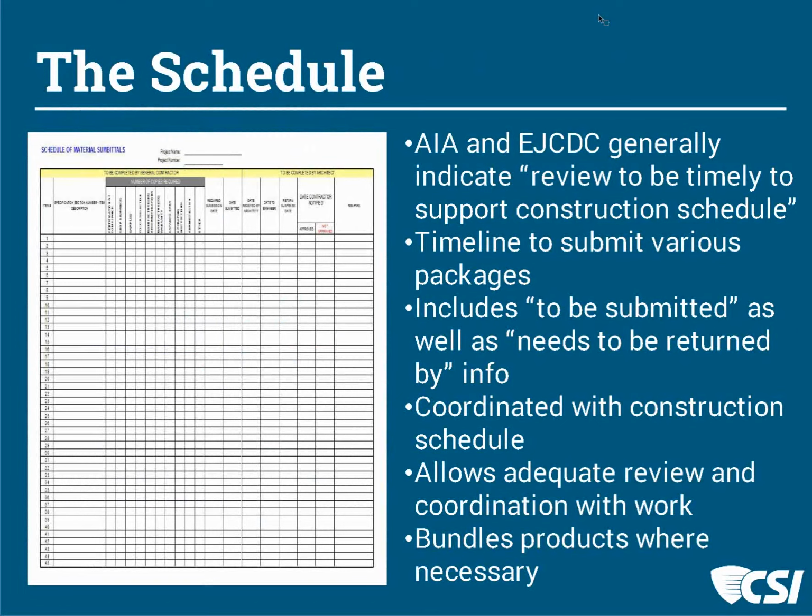Sometimes they include what is to be submitted with a date of when it's to be submitted, and also a date of when it is needed back by the contractor. And this is used to coordinate the overall construction schedule. These schedules will allow adequate time for review by each of the parties that are going to touch them, and